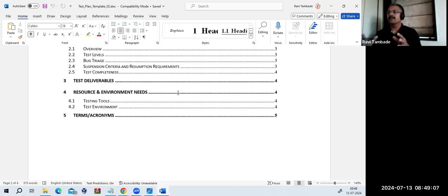If it is a sprint of particular user stories, say we have taken 7 or 8 user stories, and we are completing them within 15 days, then out of the 15 days you are going to spend at least 4 days on continuous testing before you show a demo to your customer. Are you getting? Good. So that is exactly what you try to define under this document.